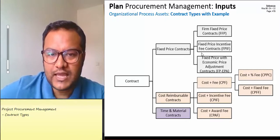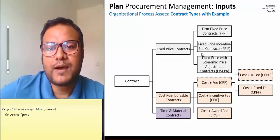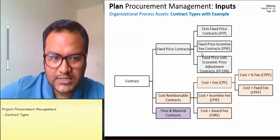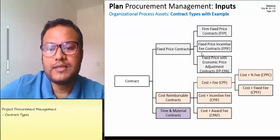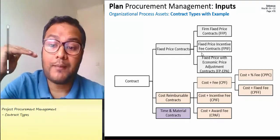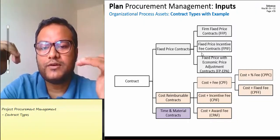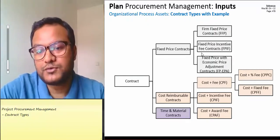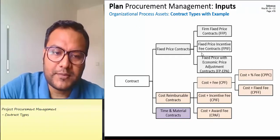For the fixed price award fee, you must use safety equipment and meet certain requirements. If you meet those requirements, you get an extra bonus — an award fee. The incentive is based on objective criteria, whereas the award fee is more subjective. You can get a cap on the award — for example, from 15,000 to 20,000.